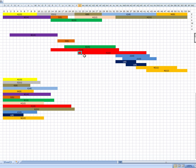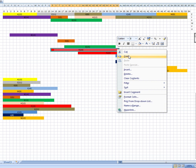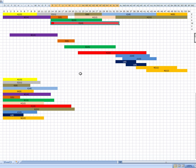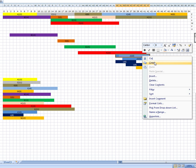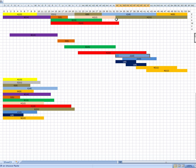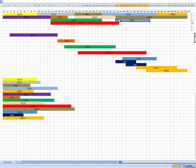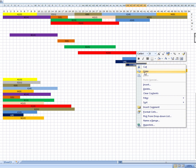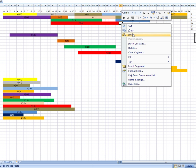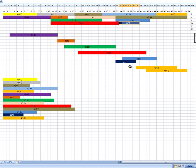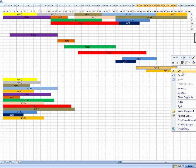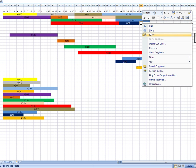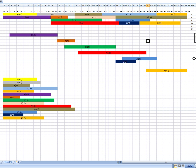The next urgent is F, which must be started by here. Now, again, none of these three workers can start it in time. So we need another worker. Give it to that worker at the soonest possible time that they're available, which is there. The next urgent is J, which must be started by here. Now, we can give J to worker X, who's free at this time. You can start the job here. So worker X has got nothing to do for four days there. L is the next urgent. And again, we're going to give this to this worker. Can't start it as soon as we'd like, but doesn't have to wait until the very last moment to do this. And the next job is N, which has got a bit of free time. You can give that to this person starting at day 40. So if you didn't get what I did there, go back through this clip. You'll see that we need four workers. We don't need workers V and workers U.